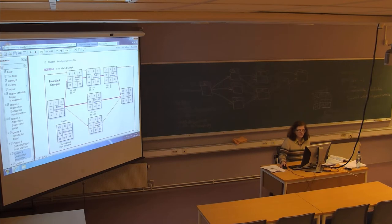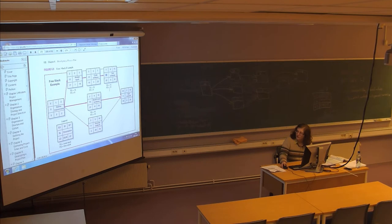Going to chapter six, page 173, you can see the total slack here is 15 — that's what we calculated. The total slack is 15 here and 15 here. But the free slack is only given to the last node in the chain. So it's 15 as the free slack at the end, but it's zero at the preceding nodes.